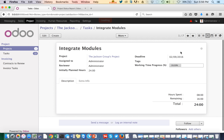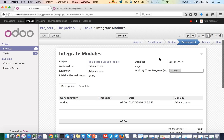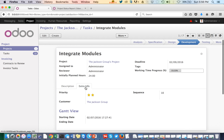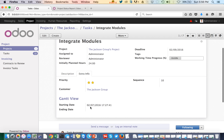Each task has an estimation date and deadline — everything is properly configured. It is important that you configure a proper start date, planned hours, and deadline to generate the Gantt chart correctly.